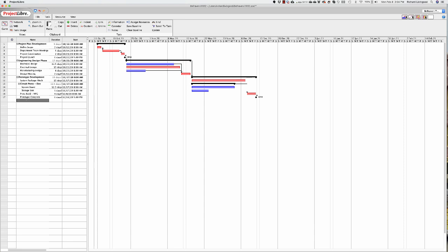Sometimes, especially once the project launches, you're not planning anymore. You're tracking progress, and as you start to get actual numbers, let's say under circuit prototype, let's just use the storage unit as an example. The storage unit will take 5 days to prototype. And let's say they run into a problem, and now instead of 5 days, it's taken 10 days. Well, it impacts a bunch of things.